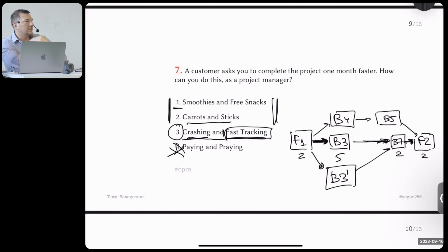So while you discuss this with the customer, everybody works as before. So you have the baseline, you have it on the wall. The baseline says, this is our critical path. Everybody continues working. Then the customer comes to you and says, it's too long, I need it faster. You say, okay, let's discuss. But everybody continues working. Then you discuss, and the customer says, maybe I will approve, calculate me the budget. You calculate a new number, and then the customer says no. You say no problem, you get back to the original baseline. Or they say yes, you approve the baseline, you put the new baseline on the wall.